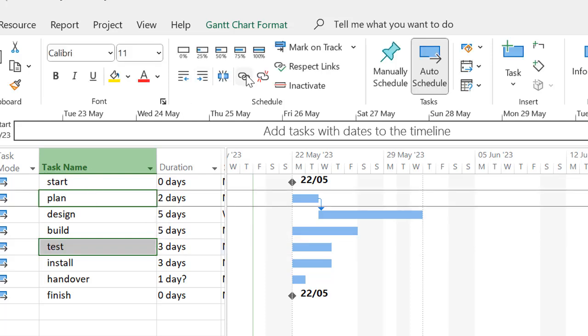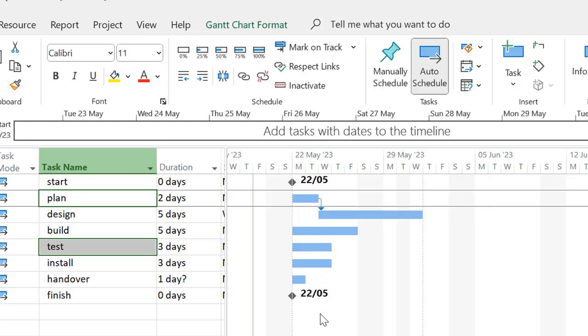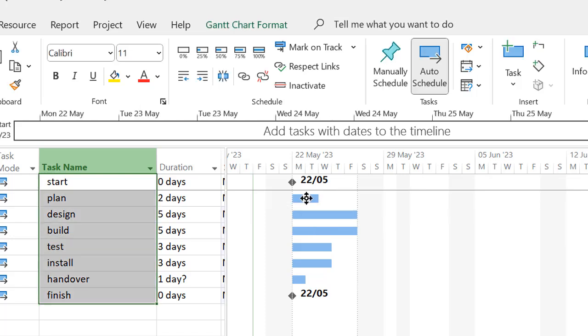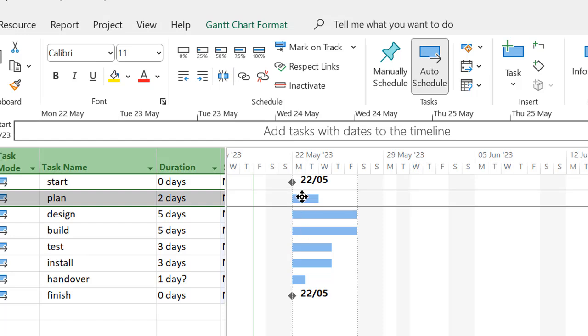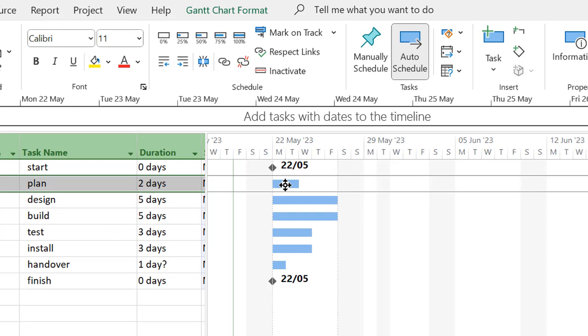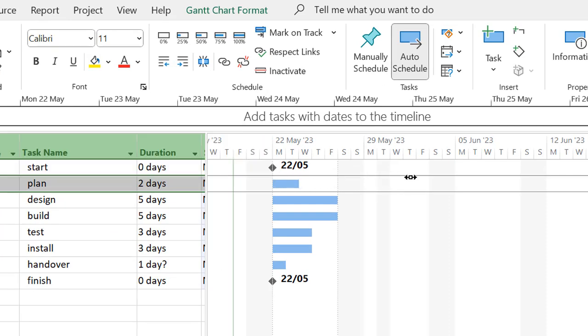If I now link together, you'll see it shows test first, then plan second. Again, let's delete that. Now when you hold your mouse over the bar and click and hold, you must be careful only to go up or down, never to the right. But here's what you've got to watch out for. Again, get my 4-pointed arrow over the bar itself, click and hold the left-hand button and move, let's say accidentally, it will then stay there.